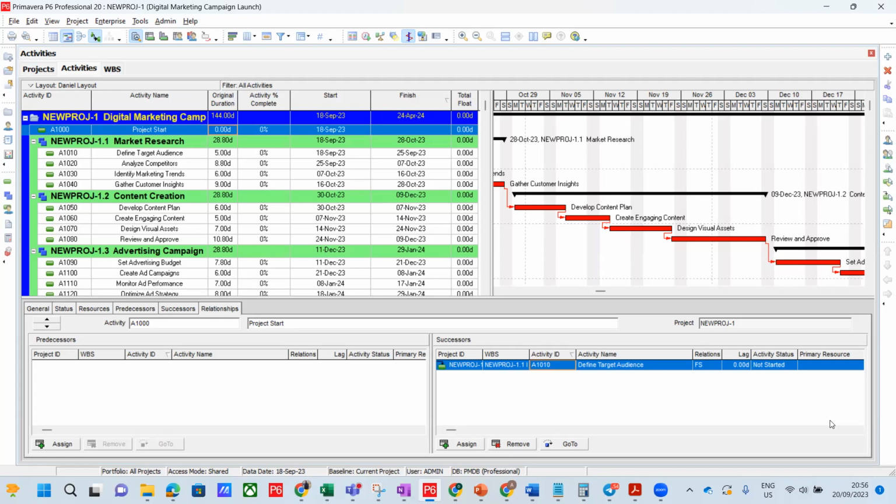You will need them. Labor can be measured, the unit to measure labor could be in hours, and they call it man hour. And the non-labor could be in hours as well. They can say, I'm renting your Caterpillar for a day. We will then say, okay, our day is 9 hours.